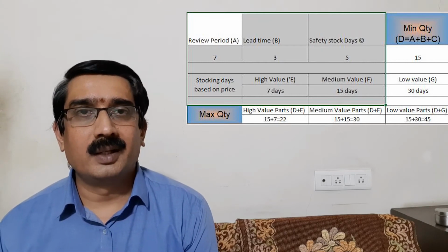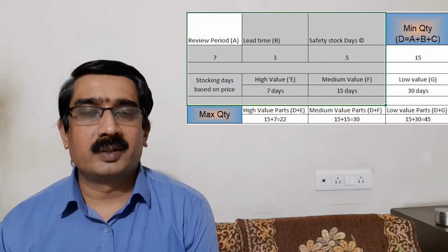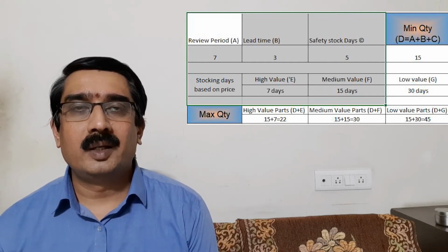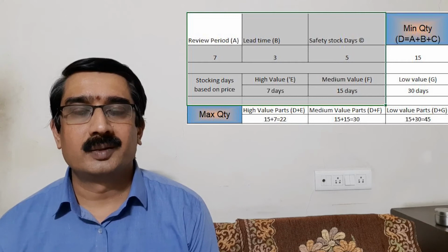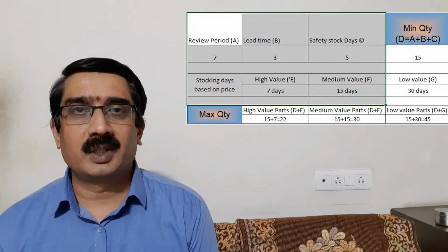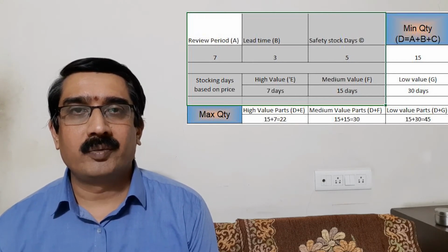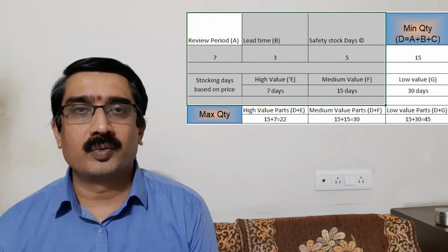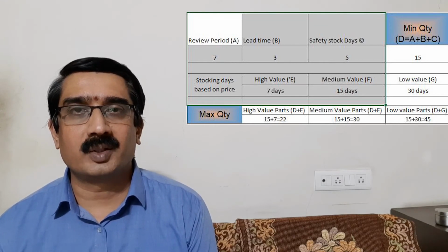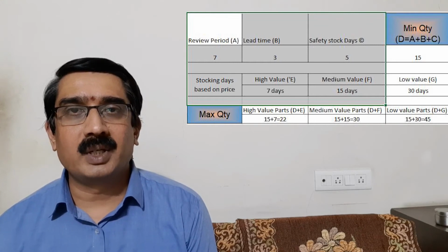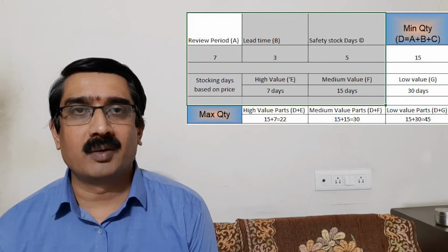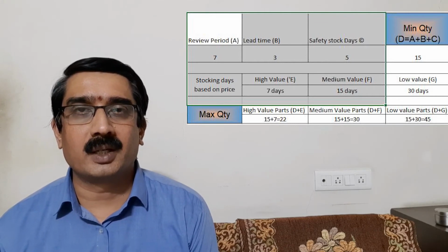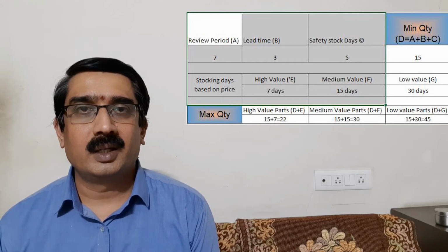That is called lead time. What is lead time? Lead time is the time interval between submitting an order and receiving the material in our system. It is not just receipt at the dealership, because if we take an additional day or two to receive those materials in our system, we cannot issue the parts until then. Hence, it is recommended to consider the time interval between submitting an order and receiving the material in our system.